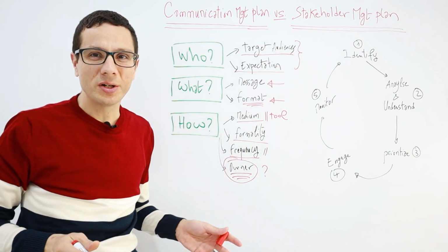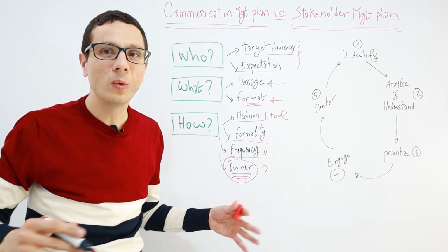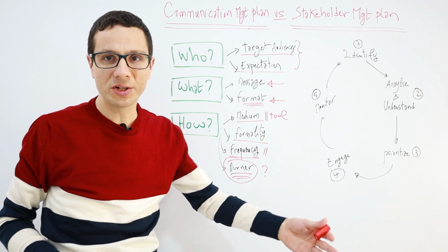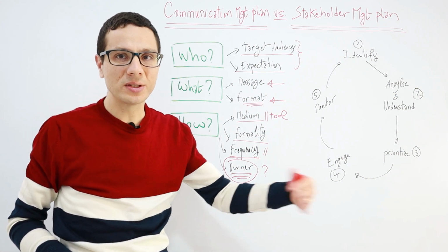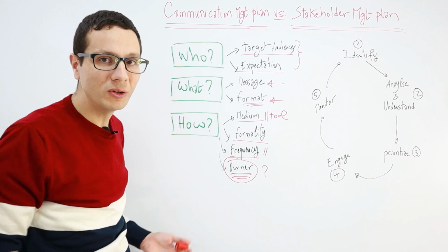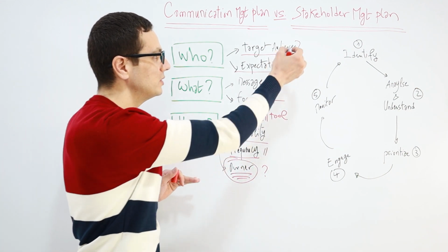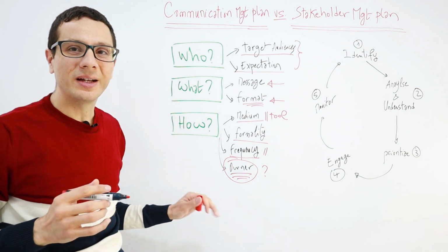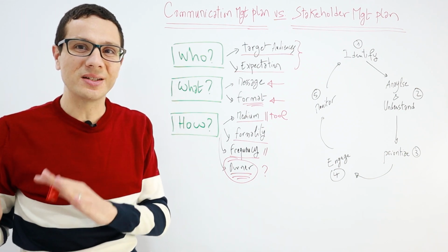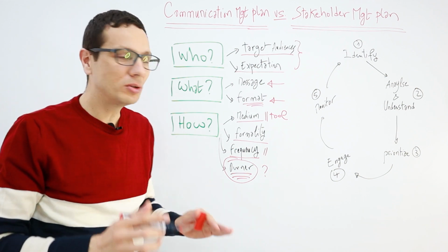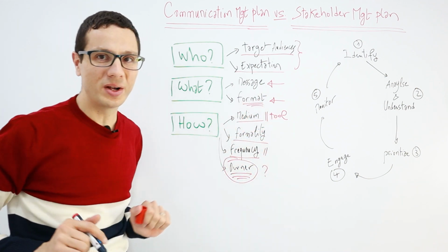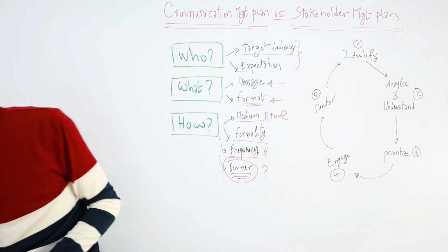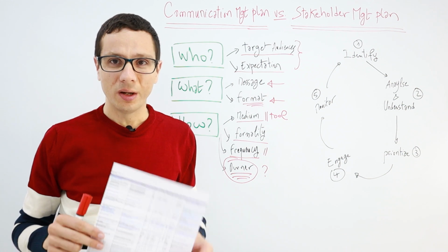At the beginning of the project, it's possible that we don't know all the stakeholders because when the project progresses, we might encounter other stakeholders that we don't know yet, and we should define in the communication management plan that if we find out that this stakeholder belongs to that category, we should apply this process.